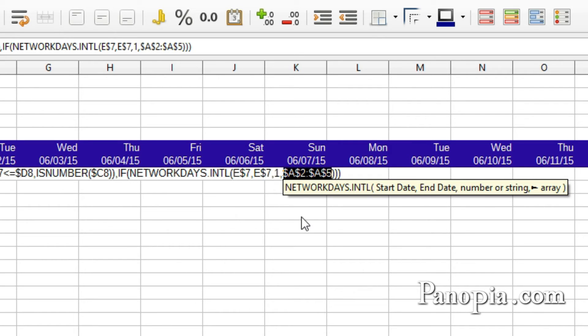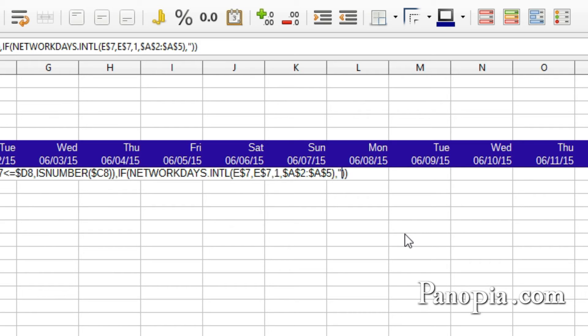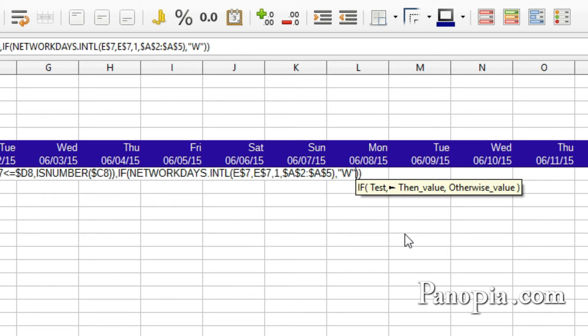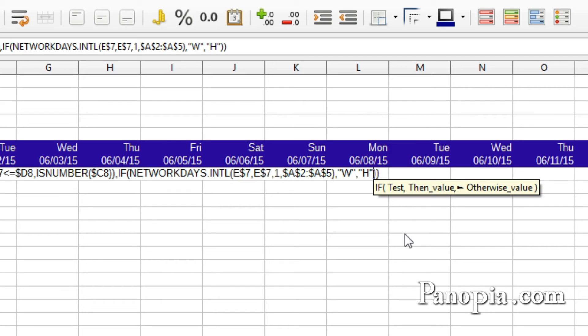The formula is going down and to the right. Now click after the NETWORKDAYS INTERNATIONAL parentheses. Type a comma. Then quote, W, end quote. Comma. Quote, H, end quote. So, if it's a workday, a W is displayed. If it's a non-workday, an H is displayed.